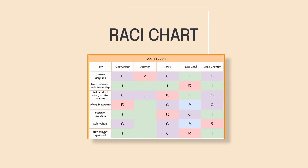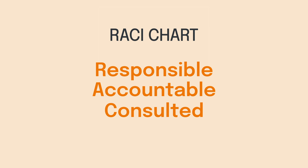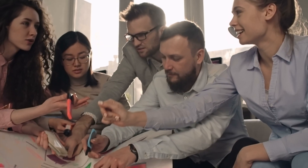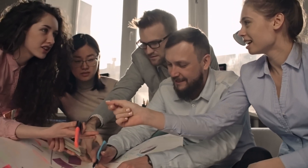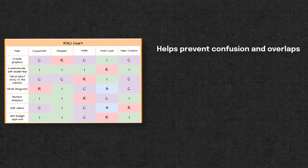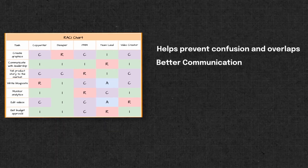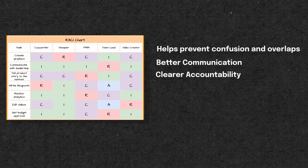At number one, we have the RACI chart. RACI stands for Responsible, Accountable, Consulted, and Informed. These roles are used to outline the responsibilities each person has in a project or process. It also means too many people aren't trying to make a decision at once, and it's clear throughout the project who to turn to when the need arises to make executive decisions. Mapping out roles in the RACI chart can help prevent confusion and overlap in responsibility, ensuring better communication and clearer accountability throughout your project.